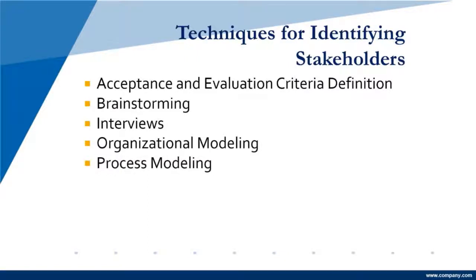Sometimes process modeling can help you identify stakeholders. How this works is, if you're modeling a process, you're saying that this person passes information to that person. In that modeling, you see the interconnected nature of the business, and in seeing that, you can identify the who's that are around, because stakeholder identification is finding the who's. Who needs to be involved? Who needs to be notified? But process modeling is a different tactic of finding the information.